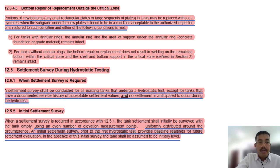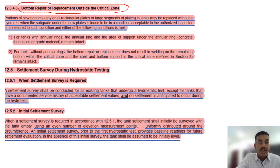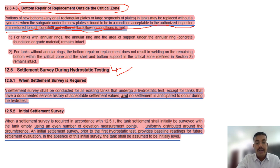For alternation or repair of floating roofs, a hydrostatic test is not required unless there is a major alteration or major repair. Bottom repair or replacement outside the critical zone is acceptable; however, inside the critical zone, care must be taken. A portion of new bottoms may be replaced without a hydrostatic test when the subgrade is found to be in acceptable condition.